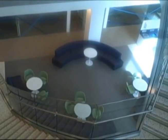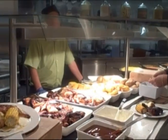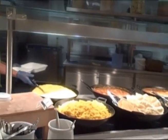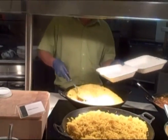Whereas if we didn't have that, we'd have spent months trialling the building systems, or had dissatisfied customers because they were moving in and the building systems weren't working properly. It does make you wonder why people don't do it more frequently. You know, it's basic standard practice to hand buildings over to fit-out consultants in their entirety. But then you end up not sure what you've got, and not really sure what you're walking into.